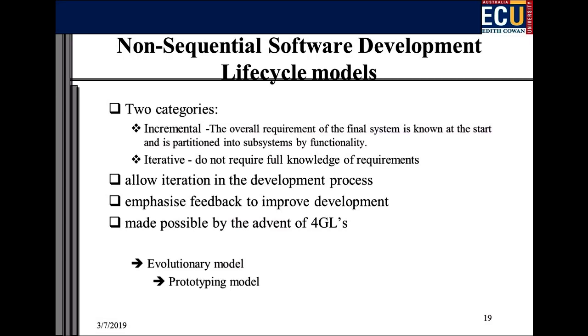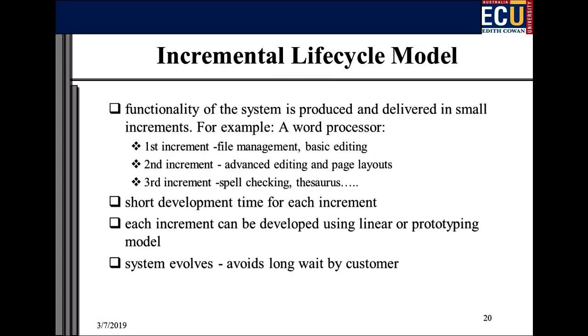And there's actually two. There's incremental, and you can iterate whichever methodology you use, and there's the prototyping approach. They seem very similar on one hand. We'll get back to that. If you go for the incremental life cycle model, you have a broad overview of a total system architecture or a set of specifications, basically things your system will be doing. And you pick the most important one and you do that and you make sure it works. And then you do the next one, and so on. And you just hope that they all work with each other.